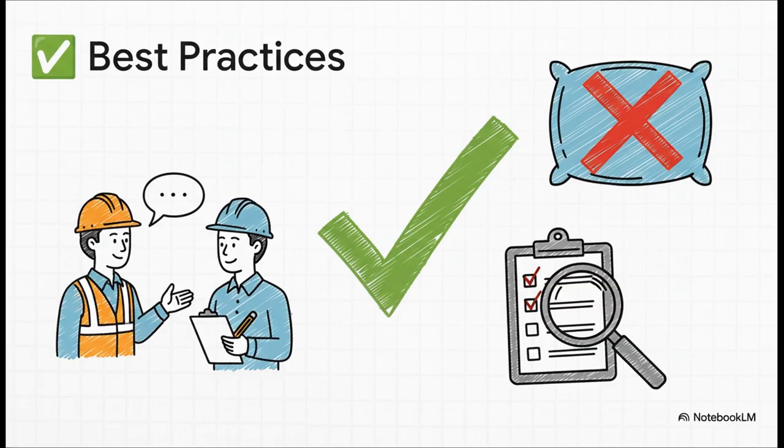Also, and this is so key for integrity, don't pad your estimates with hidden cushions of money or time. Be upfront about the costs and use a formal, separate risk fund to account for uncertainty. It's all about being transparent.